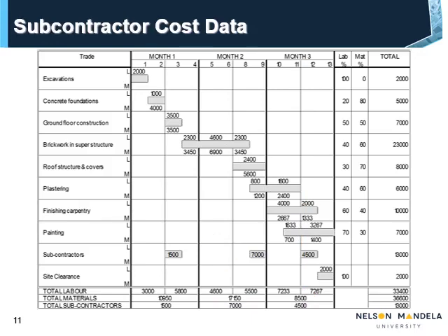The only cost that now remains is that for subcontractors. Here, again remember that the subcontractors will also be paid on a monthly basis. You will find that the subcontractor costs for each activity is indicated on the inside of each activity bar. Therefore, similar to adding the material cost, consider the subcontractor costs for each month. In this case there is only one amount for each month.